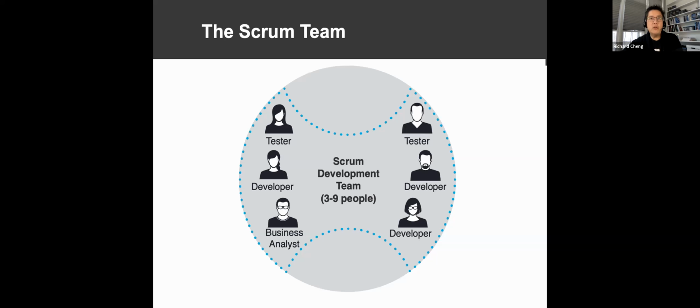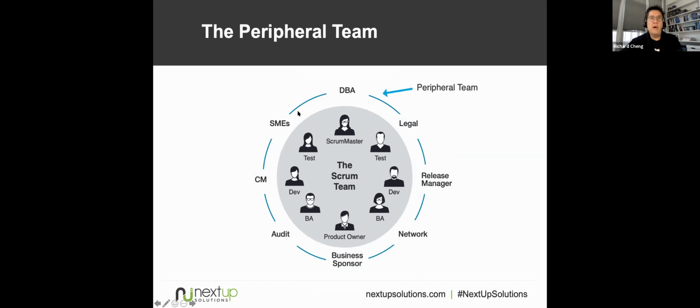Okay, great. So as a bit of terminology, when we say Scrum team, it includes the product owner and the Scrum Master. When we say the dev team, it does not include product owner, does not include Scrum Master. So 3 roles in Scrum: Scrum Master, product owner, and dev team. And by dev team, it could be any team member, developer, tester, analyst, whoever it takes to get the job done. And then you have other folks outside the Scrum team, like subject matter experts, business sponsors, various other folks. So those are the roles in Scrum.